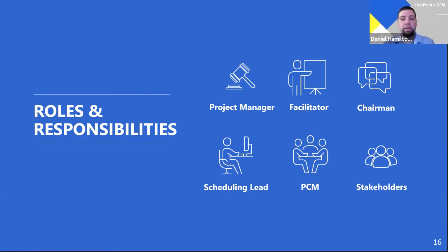They're going to prepare and assign a list of activities. They're going to discuss their logic and dates to their deliverables, including their questions and needs. They're really the heart of building the schedule and putting the logic, durations, and the overall timeline together. So these will be people such as your engineering leads, process, piping, mechanical, etc., or even construction foremen when putting the schedule together as well.